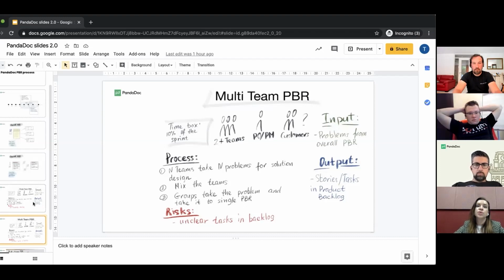First thing, you need to do the kickoff meeting where you dive into the feature. Product manager gives more information, you ask questions, you decide whether investigation is needed or consultation with our architecture committee and creation of high-level design or ADR or POC or something like this. Then, when all questions are asked and all investigation is completed, we dive into decomposition.